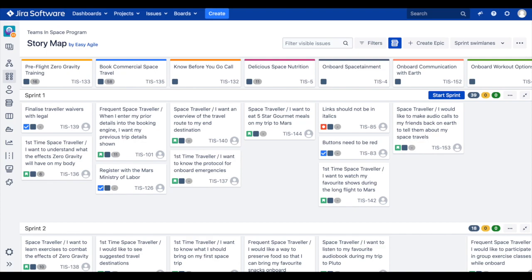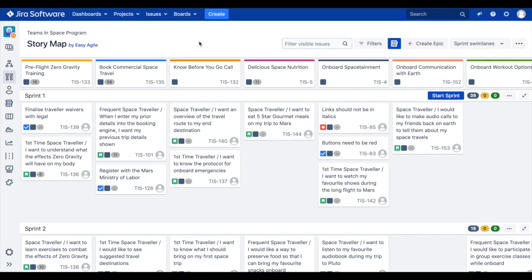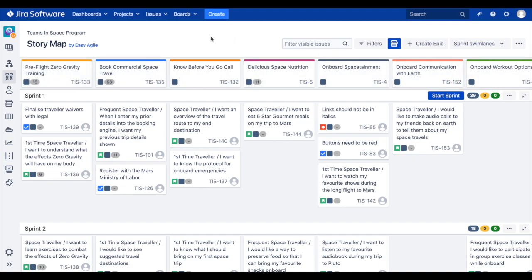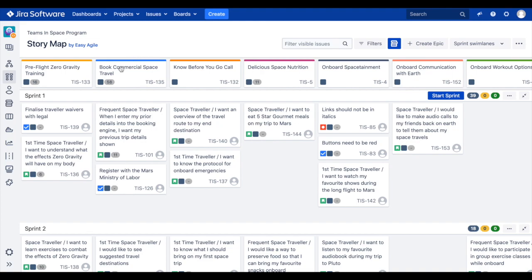We're now going to walk through the elements you're seeing on your screen. Lining the top of our user story map, forming what we learned in part one was called the backbone, are the epics from our Agile board. These epics will appear left to right in their rank order pulled directly from the Agile board. Each epic represents a customer activity of a user's journey through the product. For example, a fictitious Teams in Space program may have several activities across its backbone, from book commercial space travel through to onboard space attainment. There will be an epic for each.